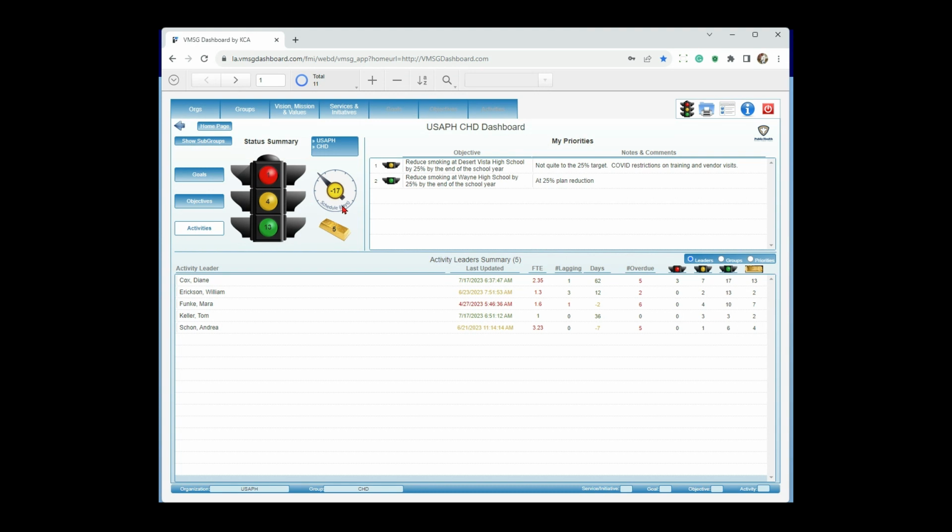If we are 50% complete or greater, then we're on track. If, let's say, we're only 40% complete and we're halfway through the year, we're 10% behind schedule. If we're 60% complete, we're 10% ahead of schedule. So what it's doing is looking at all of that for all the 23 activities and saying, aggregately, we're at 17 days behind schedule.